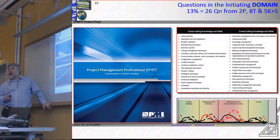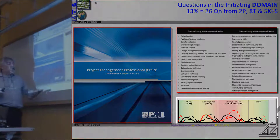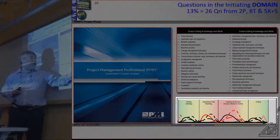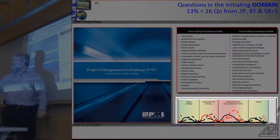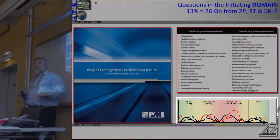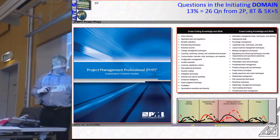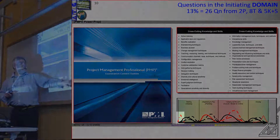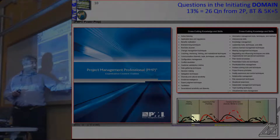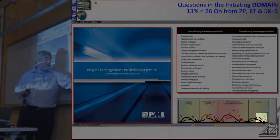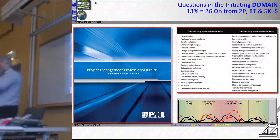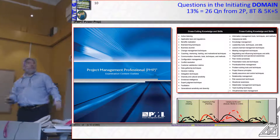Because I'm trying to give you an overview, there are some things I haven't shared with you yet that were relevant to this conversation. The PMBOK tells us a project is divided up into four phases: starting, organizing and preparing, carrying out the work, and closing. And you know from page 25 that it's divided into five process groups. Every one of those process groups is active in every one of the phases, but the emphasis is different. So the emphasis in starting is on initiating, but there's still some closing. And the emphasis in closing is closing, but there's still some initiating.